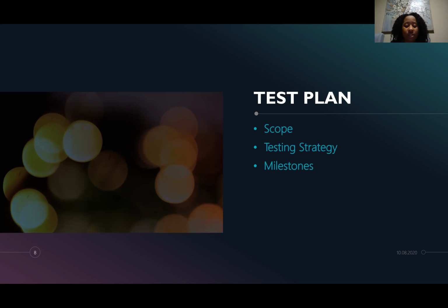And next, I will mention the major activities, techniques, and tools to be used for testing the designated groups of features: unit testing, system integration testing, performance and stress testing, user acceptance testing, batch testing, automated regression testing, and beta testing. The test milestones include test plan creation, test completion, defects logging, daily status report, weekly status report, test feedback received and documented, test closure report. It is important to note that these milestones are tentative and can change due to the following reasons: any issues in the system environment readiness, any changes in the scope of the project, and any dependency that may impact the testing efforts and project timeline.